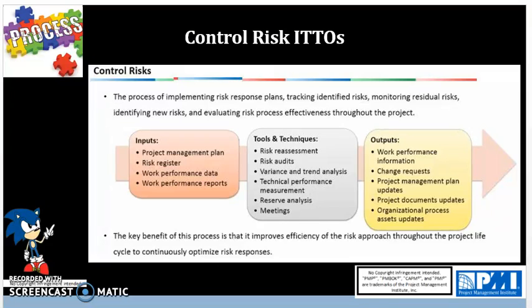Outputs from this process include work performance information, or WPI. As with other controlling processes, the hallmark data flow is that work performance data comes in and is analyzed in context to provide information relevant to the project. This WPI is then sent to monitor and control project work to create a work performance report. We also expect change requests, as we might have to submit recommended corrective actions or preventative actions while analyzing and controlling risks.